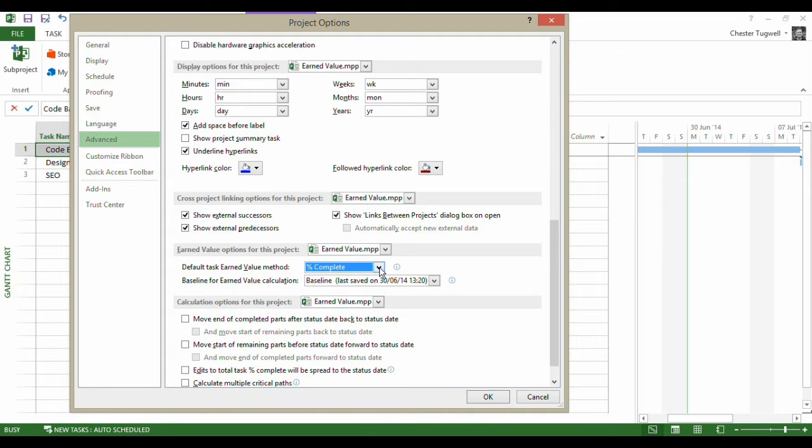Now percentage complete. So by default, the earned value method will base its calculation on the percentage of the duration of a task completed.